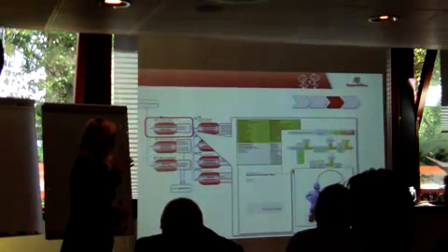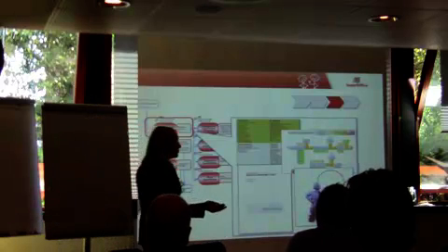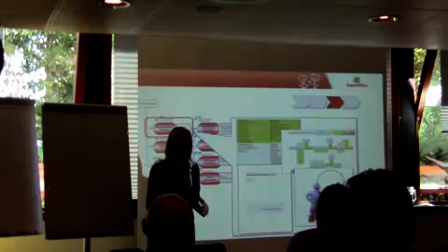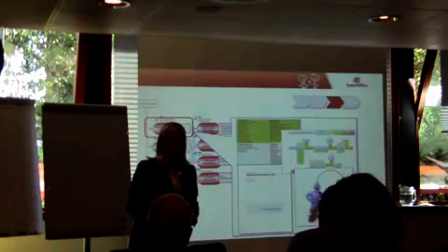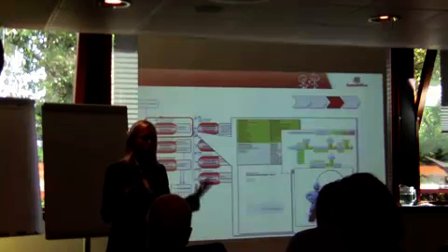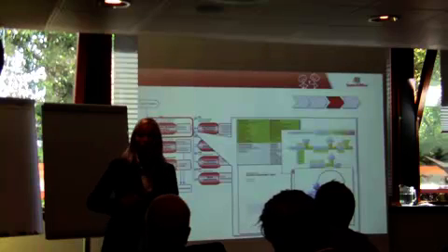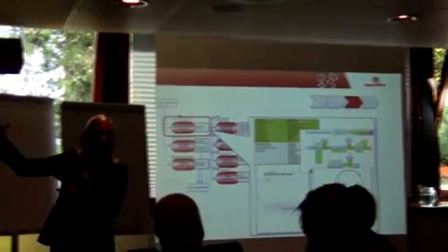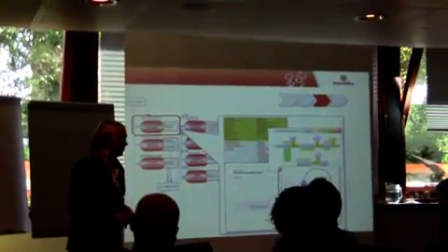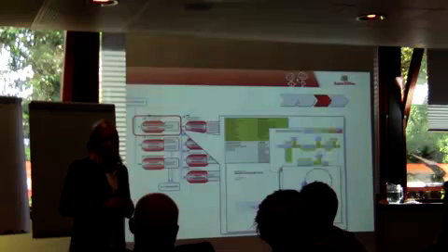We spend the whole day together with the customer. Often two consultants, one facilitator and one person documenting, because it's very difficult, as you will see, and maybe you've experienced that as well when you use the brown paper method. It's very difficult to facilitate and document at the same time. You run between the paper and the computer or your notebook, so you need to be two people. But you spend one day in general, one day per process together with the customer.